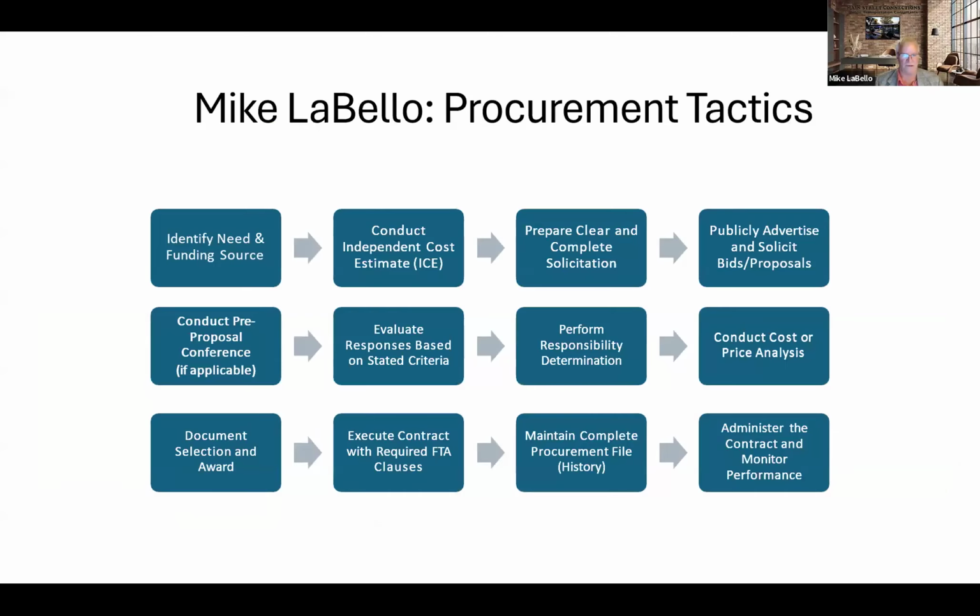Thanks, Al. Welcome, everyone. Well, this slide is titled Procurement Tactics, but you can really call it anything you want. Call it actions, events, activities. Could be steps, could be procedures. Essentially, what it's about is the progression of a project. The project starts as an idea. Eventually, a decision is made to move it forward. You develop and lead a solicitation. You have an evaluation process. You award a vendor. And of course, you implement the project.